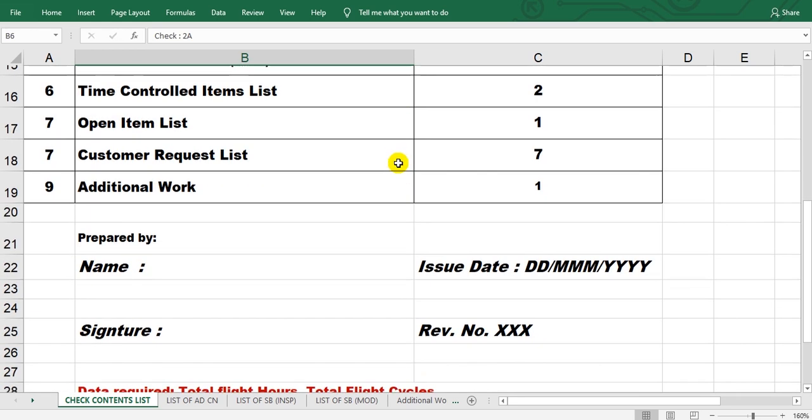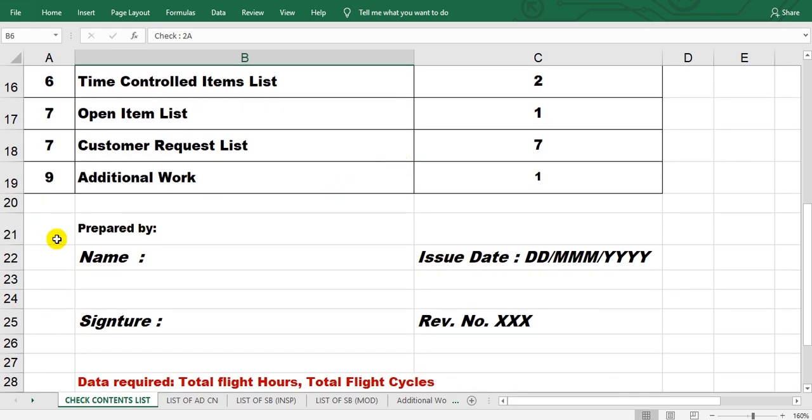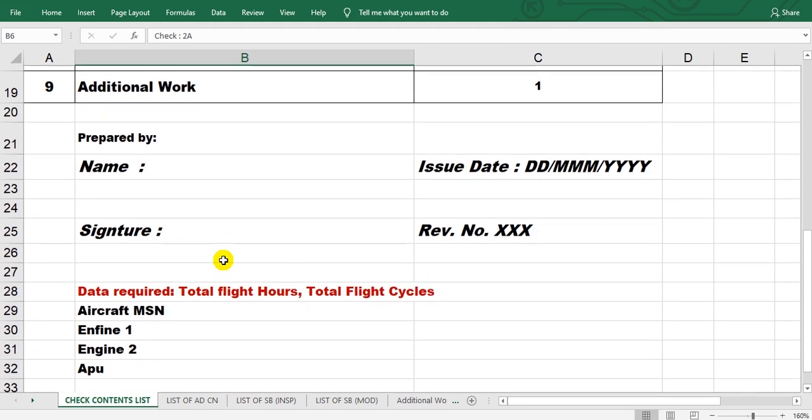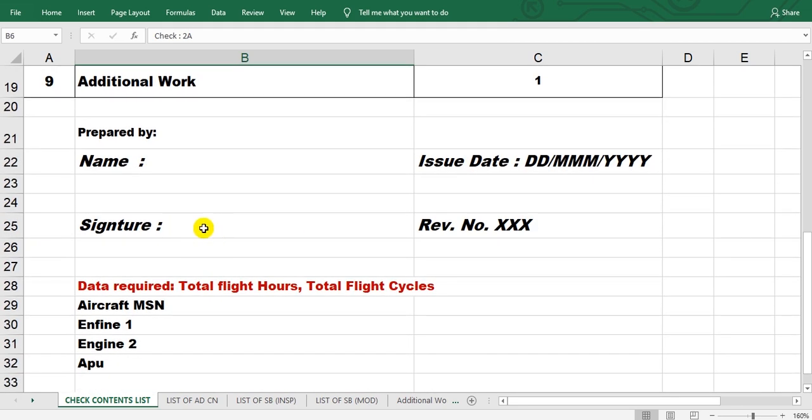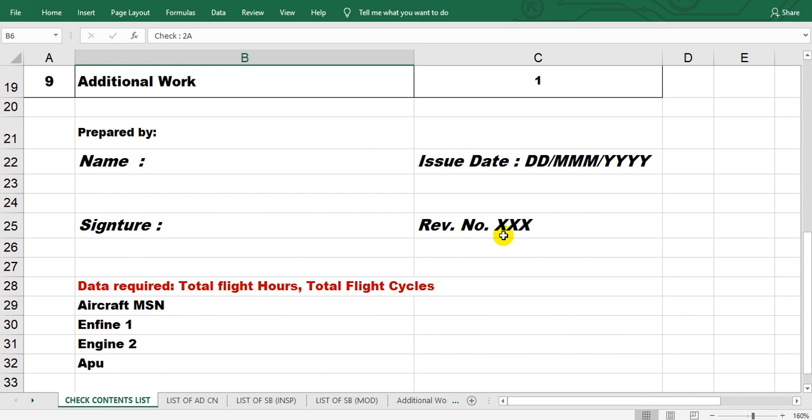Additional work. Here after this list, prepared by the name of the responsible man, the issue date of preparation, signature, and the revision of this bill of work. May be corrected or reviewed, another thing, may be another revision.